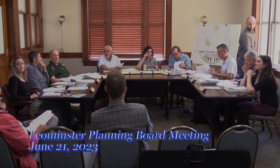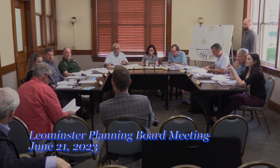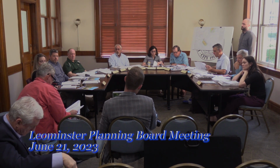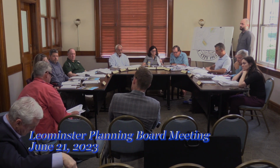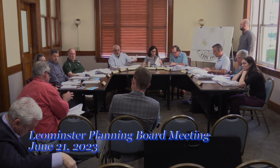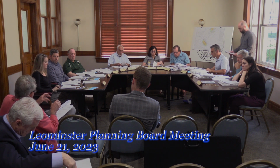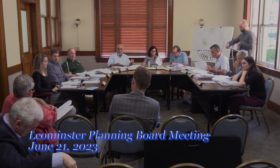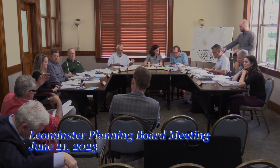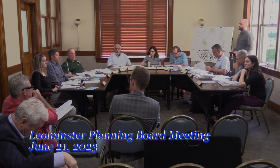Before we start, can I address? Sure. Just quick. We apologize for the delay in getting back. But I'd like to point out the DPW, what he's asking for is just a statement signed and stamped by an engineer reviewing the drainage analysis. So we will have that. In other words, his comment is not that we have a stamped engineered plan that says that we have met his criteria. So we're going to go to DPW, and we're going to go to conservation and get an order of conditions, conditional on the fact that we meet their requirements. It wasn't like a review thing where we had to come and show them something. They just wanted it to be stamped. We go to the conservation, they're going to have to approve it anyways. Thank you.